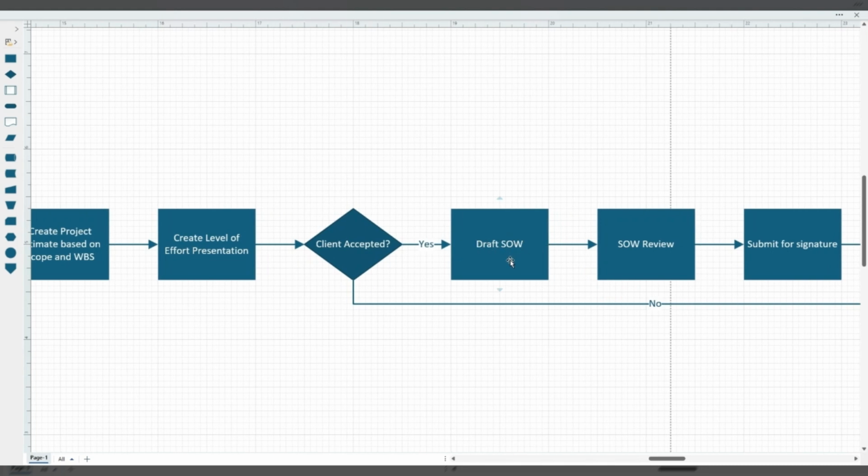After we draft our SOW, it goes through a review, and normally the review is with someone in management and in delivery to make sure that it is going to match up with what we can do, and dollars and everything else, and that it matches legally. Now, normally what we do, and what most consulting companies do, is they have someone who is pretty well versed on how these things should look, but they don't necessarily have a legal mindset. All right, so that's something that we'll come back to in a little bit.